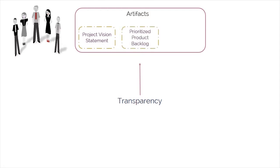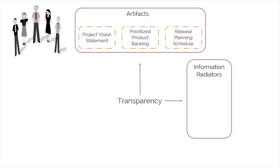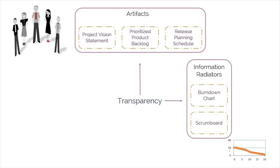Transparency is also provided by the prioritized product backlog with user stories that can be viewed by everyone both inside and outside the team, the release planning schedule which may be coordinated across multiple Scrum teams, and information radiators such as the Scrum board and burndown charts, which make a team's progress clearly visible to all.